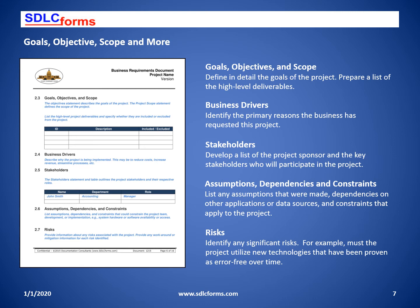Stakeholders should be identified by name, department, and their role in the project. Assumptions that were made insofar as to the project should be documented. Dependencies could be that another project must be completed before this project can be loaded into production. Constraints take many forms that can limit the project scope. Risks also take many forms — each risk must be identified with the mitigation approach and any workaround or alternate plan.